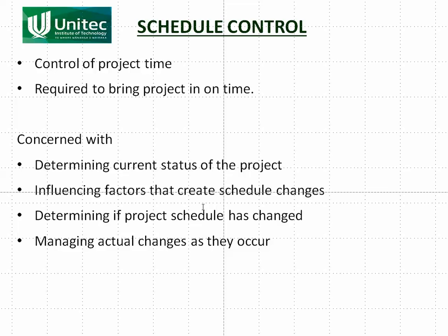You influence the changes that create the schedule changes. So what you want to do is you want to make sure that you are going to bring it in on time. If there's going to be bad weather, you're looking at that and saying, okay, there's going to be bad weather next week, we need to do these particular works, this earthworks, before the end of the week. So you might have the people working a bit longer, a bit harder, because you anticipate there's rain coming along and next week you're not going to be able to do it, so you really want to get it finished this week.